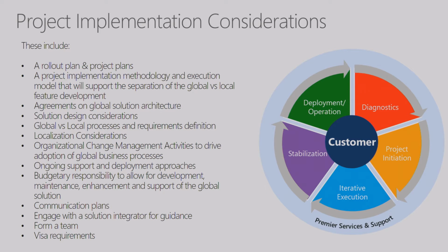Hey, you know what is going to be our approach for actually doing this project? What we have seen really work well is the iterative methodology, right? Agile, if it's a brand new project and they are not familiar with it, is going to be really fast, 2 weeks duration, and they are probably not able to get used to that flavor of methodology. So with iterative, you can define your duration, maybe 4 weeks to 6 weeks. I think the sweet spot that we saw is between 4 to 6 weeks, right?